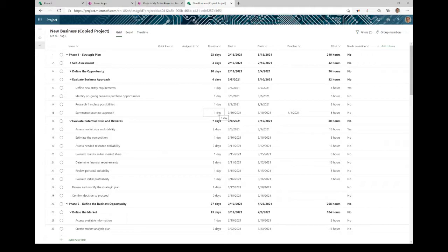And if I increase the value here, and I say this might be 1 week, then what you see happening here is that the finish date does grow because there is a longer duration, but that deadline field is actually set in stone, just like we used to have in Microsoft Project. This is easily handed over to Excel, which will come up later, and then you can have conditional formatting where you would reference the deadline field and the finish date field and maybe do some trickery there in Excel.